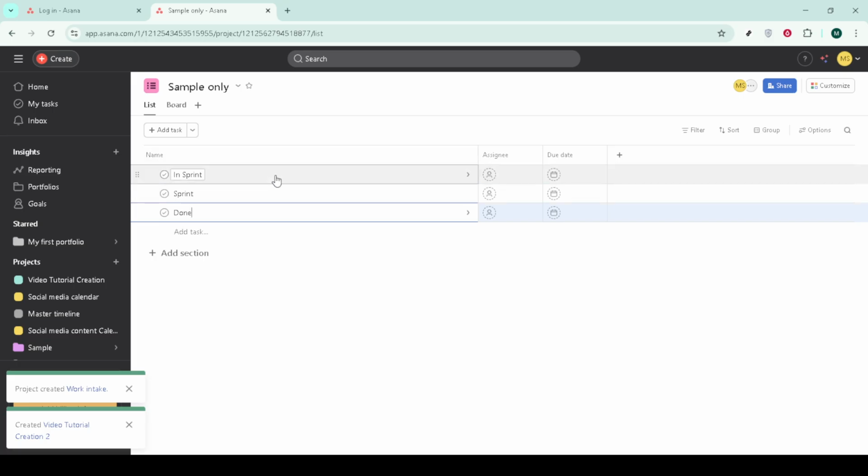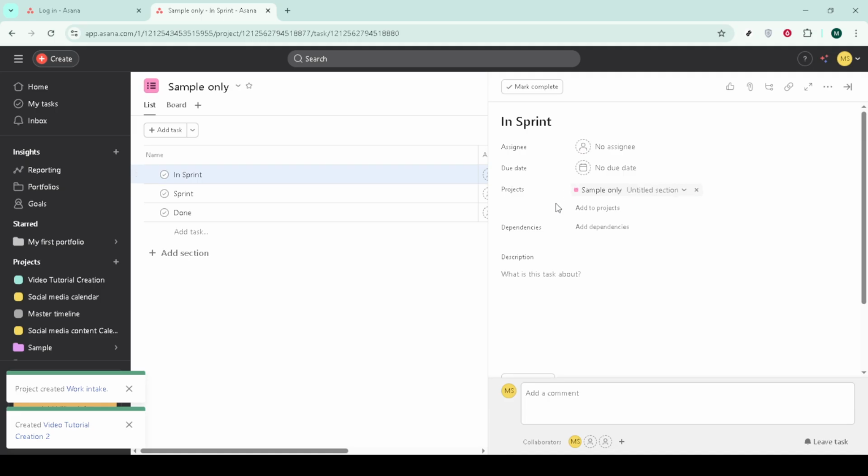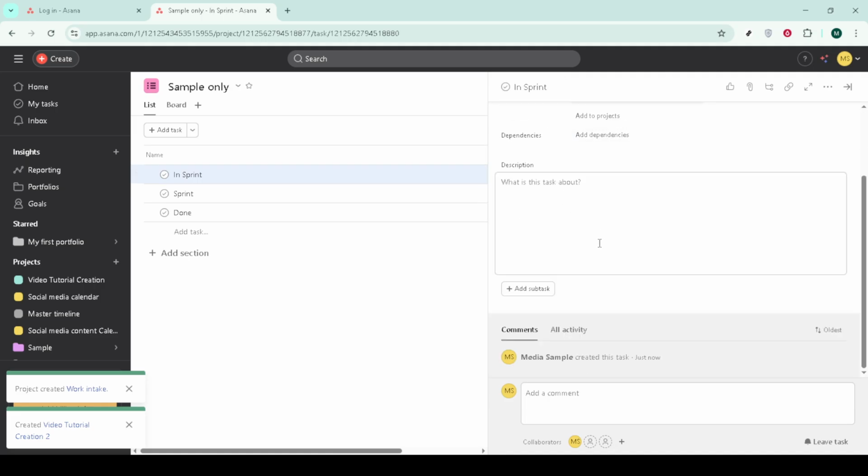Scrum stage can mirror your sections or reflect states like refinement, ready, in progress, review, and completed. Effort can capture time-based estimates or complexity if your team tracks both. Keep field names consistent across projects so views and reports align.